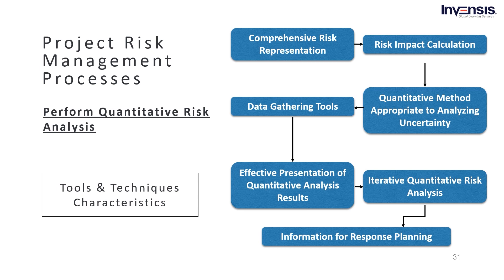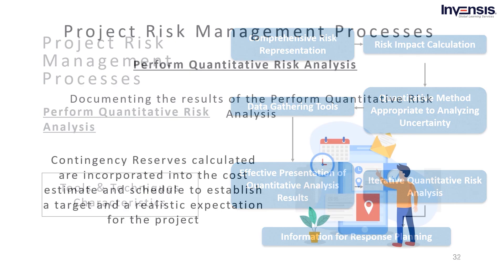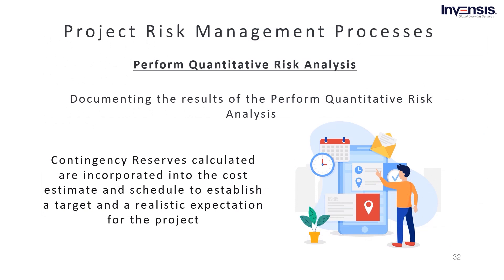If the overall risk to time and cost indicates that a scope adjustment is needed, the scope changes are agreed upon and documented, and a new quantitative risk analysis is carried out to reflect the new aspects of the project. The contingency reserves calculated are incorporated into the cost estimate and schedule to establish a target and realistic project expectations. Contingency reserves may also be established to capture opportunities judged to be priorities for the project. The analysis results may provide more or less urgency to risk response depending on the probability of achieving the plan's objectives or the amount of contingency reserve required. Finally, the quantitative risk analysis results are recorded and passed to the people responsible for managing the project for any further actions required.